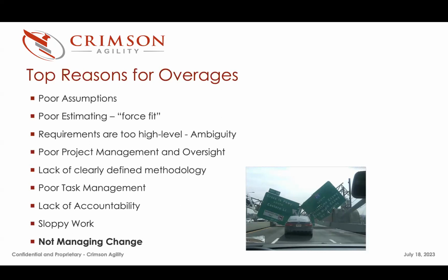Everything should have a methodology associated with it. When you go into the data, and Anais and I just got off a call for a new project that she's starting, part of it is defining, we had 40 hours allocated for data. Well, how does that 40 hours break down? Well, the first 10 hours of it is gaining access to their data, extracting it, doing some analysis of it, modeling it within the Magento instance for them, and then reviewing a clearly defined strategy and plan for the data that they sign on to. If we can't do that within the first 10 hours, which is allocated for that part of the methodology as it relates to data, then we need to ask for more time.